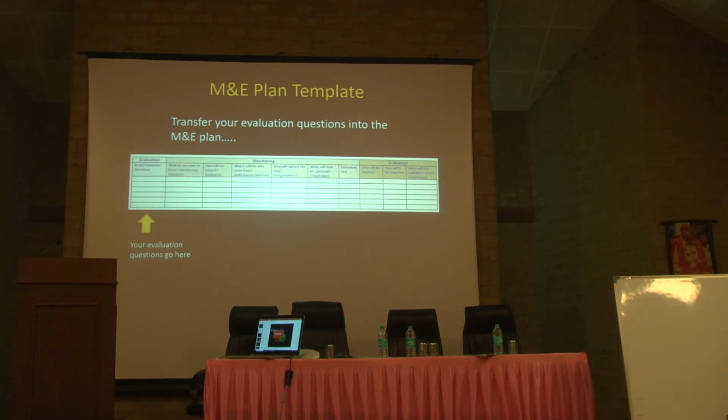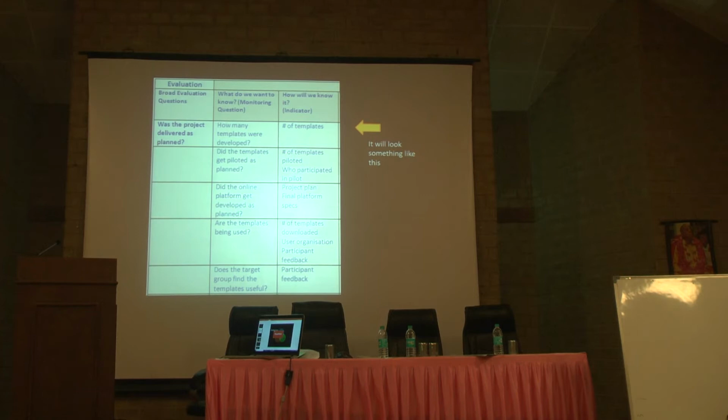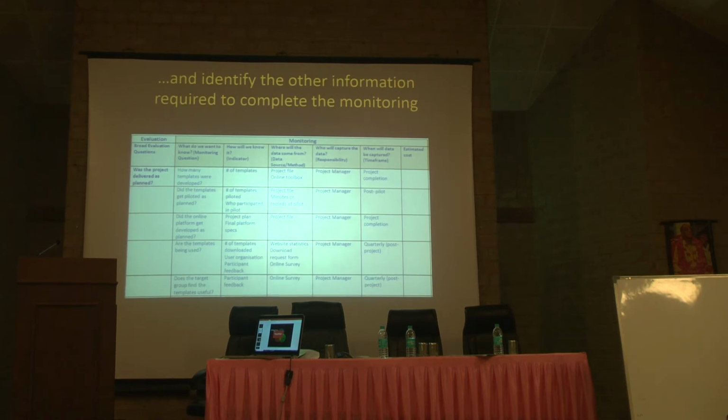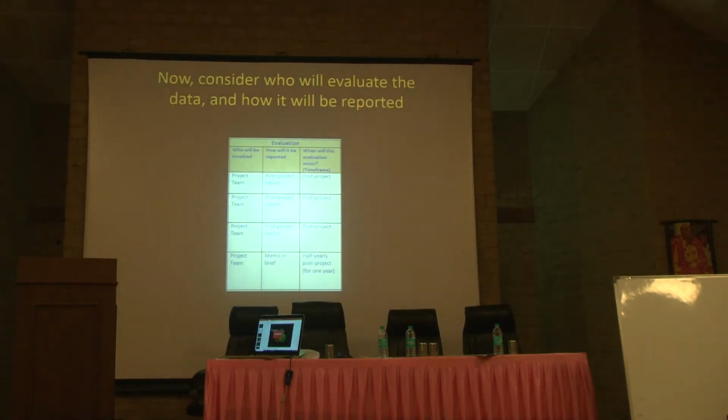Put it in a template, your questions, like this. What do we want to know? Etc. How will we know it? Where is it going to come from? Where will the data come from? And other, when will it be captured, cost, etc. Who will evaluate it?